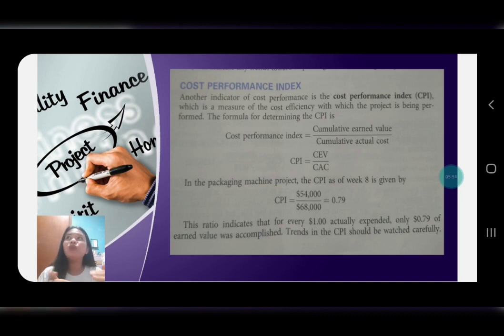We are at a loss if we have expended more budget, with a lot of expenses, than what we have to show as the finished product. So the best thing is that our actual cost should not exceed the budgeted cost relative to our earned value.